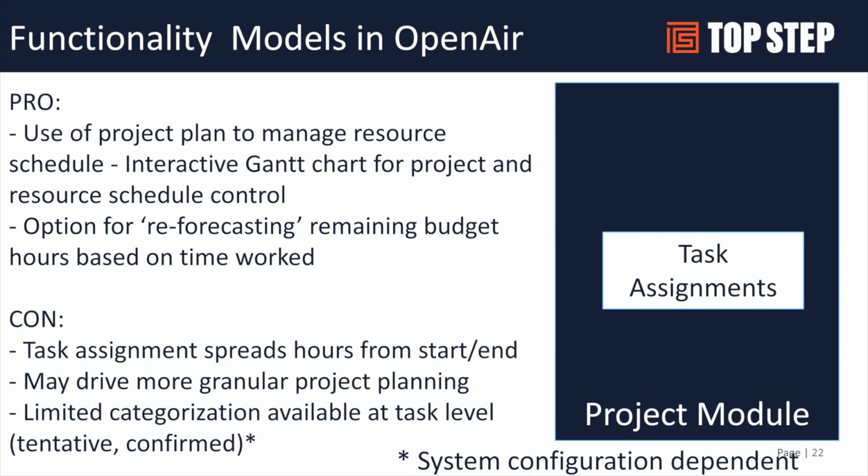And in real life, that's not the case in most projects, where you may have folks starting in one period and ending in another, and other folks starting later in that task structure and ending at a different date. To get the level of accuracy you need, you would then have to have multiple tasks, which could create very complex multiple plans. So it's not ideal from a resource management perspective, which is really why the bookings and the resource module is the powerful way to get more accurate requirements.